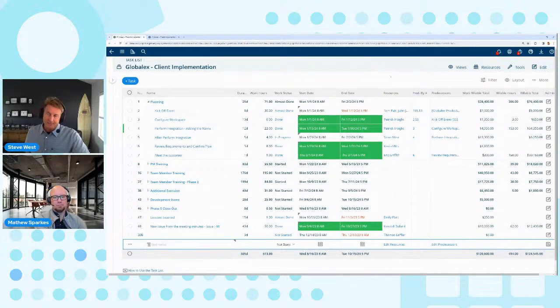What about billing them? The most common billing scenarios are, first, a time and material project, where you're just putting your time in and it's calculating, and then you have to bill it as they do the work. Another scenario, which I think is equally common, is you give somebody a proposal for a fixed bid and then you have to bill that. So we're going to go through both of those cases while I'm in this particular project.